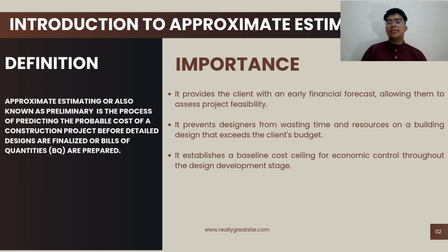So, why is it important? There are three main reasons. First, it provides the client with an early financial forecast to assess project feasibility. Second, it acts as a guide for designers, preventing them from wasting time and resources on complex designs that exceed the client's actual budget. And last but not least, it establishes a clear cost ceiling for strict economy control through the entire design development stage.